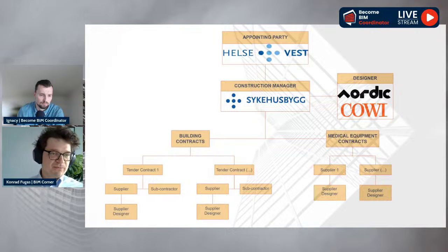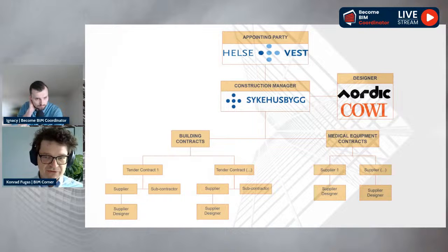And the main difference you might have noticed already from this graph is that there is a lack of general contractor. The coordination role is undertaken by the team of construction managers, and trade contracts were being signed one by one with different companies for a specific type of work.